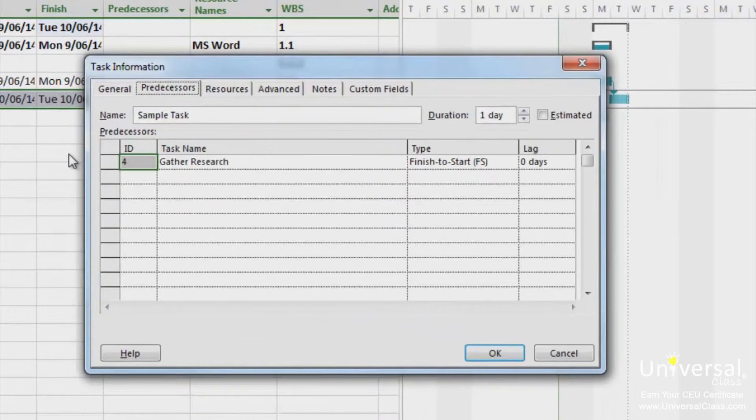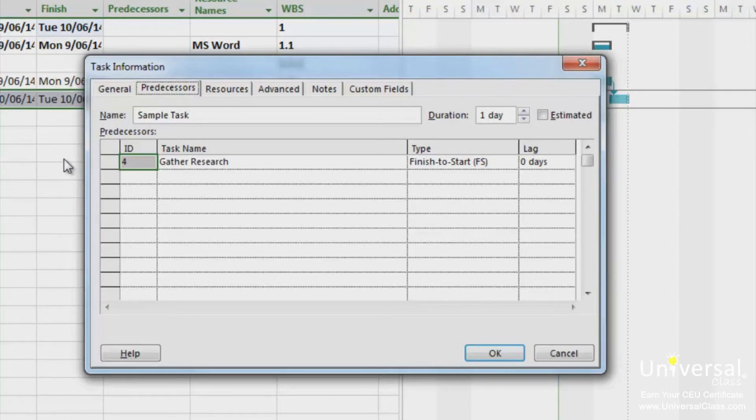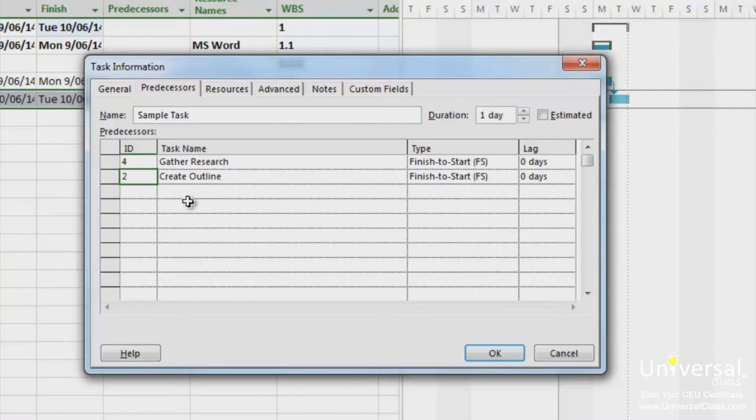In the id field, type the id number for the predecessor task. In this case, we're going to make the predecessor for this task, create outline. This task is 2, and 2 is its id. Press tab. The task name and the default finish start dependency type are entered for you automatically.